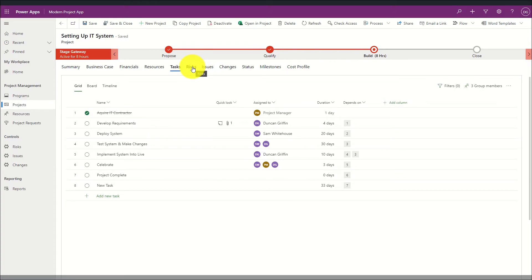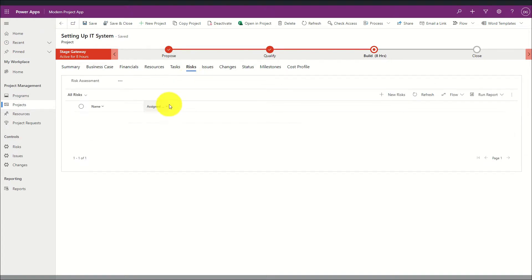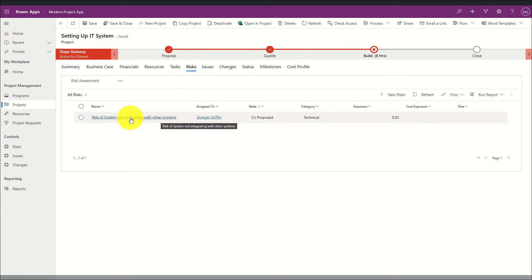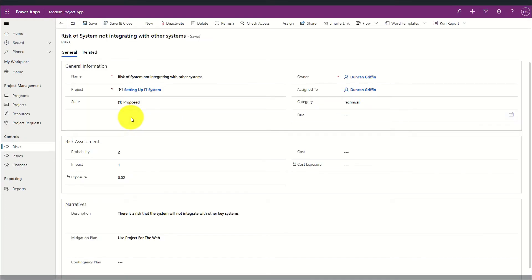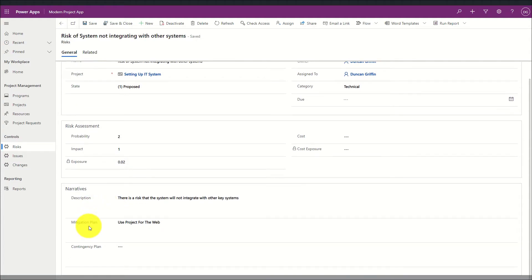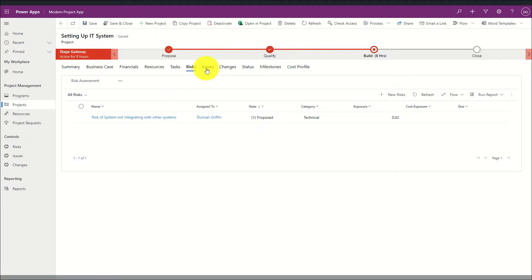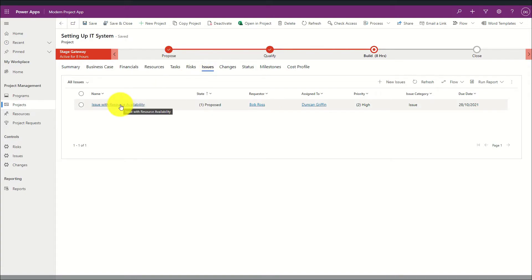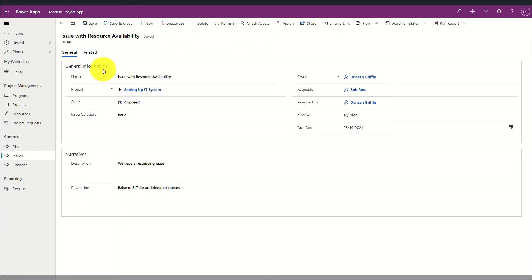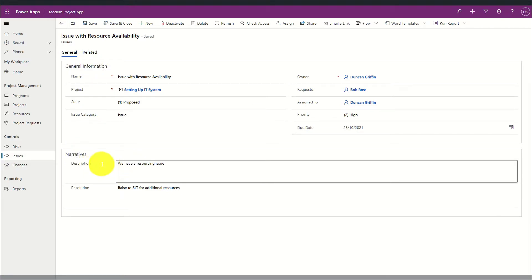I also have a risks and issues register in which I can define current risks on the project. Opening a risk item shows a risk form that can be customised to meet the specific needs of the organisation — including a general summary of the risk, a risk assessment that calculates a risk exposure, and a narrative such as the description and mitigation plan. In addition to the risk list, I also have an issues list that can be tailored to the organisation, where a custom issue record shows general information as well as a narrative about the issue and the current resolution.